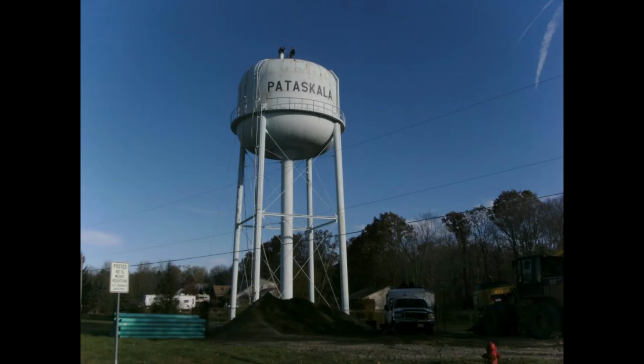Yes. We can put the purple star at the top of the red line, turn that red line into a force main. That is our third option. It'd be a big force main, but it'd be cheaper than still putting in a trunk line. Not a problem. And you've got right of way to deal with, and you don't have to build a big plant and lagoon and so forth. Right. So that meeting happens on Thursday. We'll have them start looking at the cost for that kind of thing, and try and move from there.